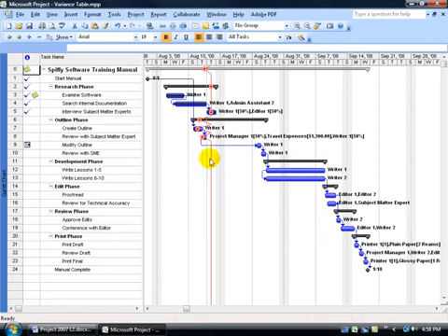And you can see that when it peaks left, it's peaking at the left of all the tasks that are behind schedule. If it peaks to the right, that means it's ahead of schedule. In this case, it looks like it's on schedule as we move from day to day. And then of course you can get rid of this or change it from the current date to the status date with the right click.